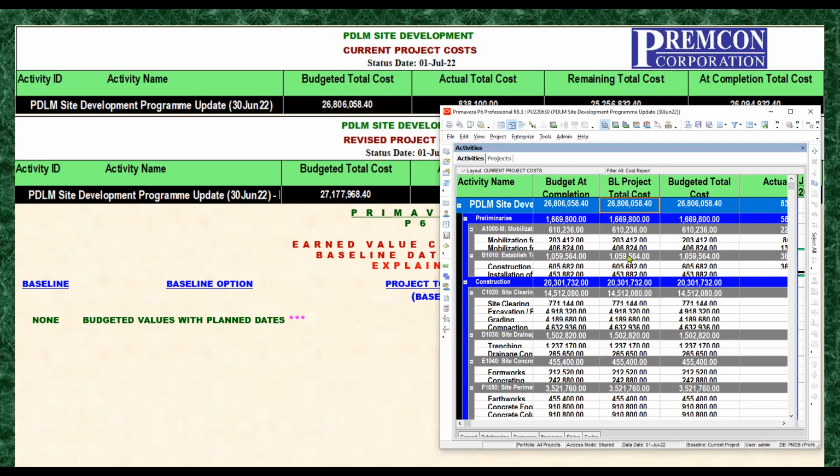That is why, as I said, if the current program that you are working with has no baseline schedule, the baseline data of that current program will adopt its own value. So whatever is the value of the current program will also be the value of the baseline program shown on your current program. So that is the reason.